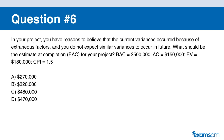Now let's do some math — question number six. In your project, you have reason to believe that the current variance occurred because of extraneous factors and you do not expect similar variances in the future. What should your Estimate at Completion (EAC) be, given that BAC = $500,000, AC = $150,000, EV = $180,000, and CPI = 1.5? A: $270,000. B: $320,000. C: $480,000. D: $470,000.